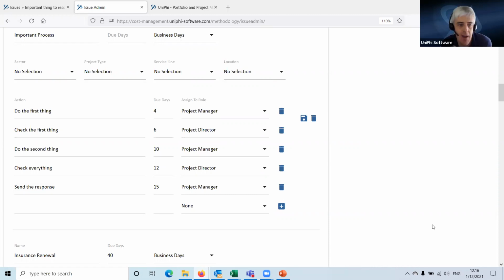So, you may have contracts that you're managing that when a particular thing happens, for instance, an event that might trigger an extension of time, that might trigger you have to do particular things within particular dates. The contractor has to do things within particular dates for this all to apply. This allows you to log that at the point that it happens, and then you've got these dates tracking. These flow into each individual's task list. You can run reports to see, have these been done? Are they now overdue? They've been ignored, they've happened.